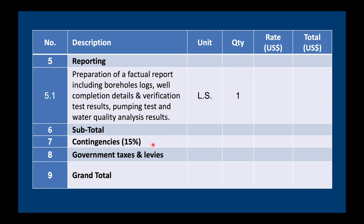Then we have our contingency — item number seven. We can be pretty sure we're not going to go too much below 100 meters, so it's only about 15%. But contingencies could be higher if we're less certain — for example, 25%. Finally, we should add any government taxes or other costs the contractor has to pay, because they're going to charge it to us anyway. If this is forgotten, it can be quite a big surprise if VAT or other charges appear at the bottom of an invoice that we didn't budget for. Adding everything together gives us our grand total.